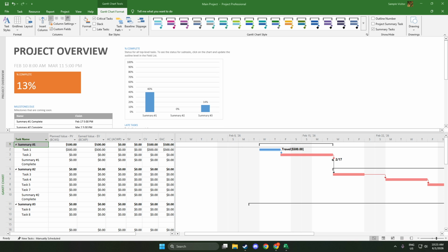Work Overview helps you understand how effort is spread across your team and time. You'll see planned work, remaining work, and who may be over or under allocated. It's a straightforward way to spot bottlenecks and rebalance assignments before issues turn into delays.